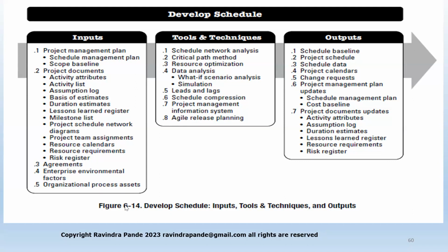So bench are the resources who are not allocated to a project, and they are with the resource manager, or they are the resources normally prepared for some training or pulled out of a project for some training. Might be new technology, new tools, or anything. But whenever a project needs, these resources can get attached to a project for a few hours, for a few days. And normally a few days means 2 or 3 days at the max.